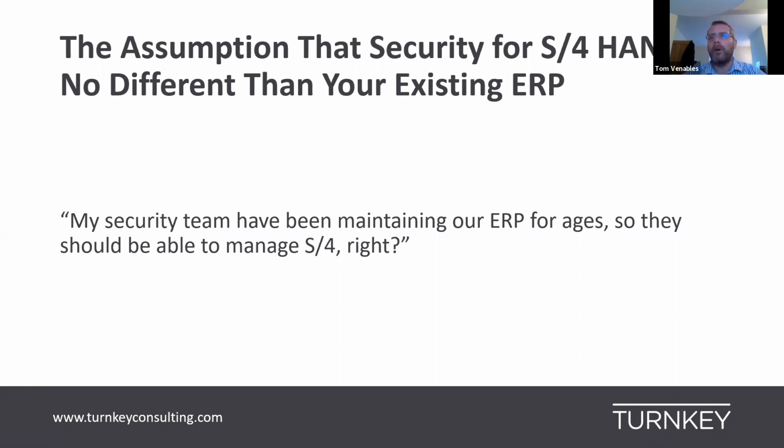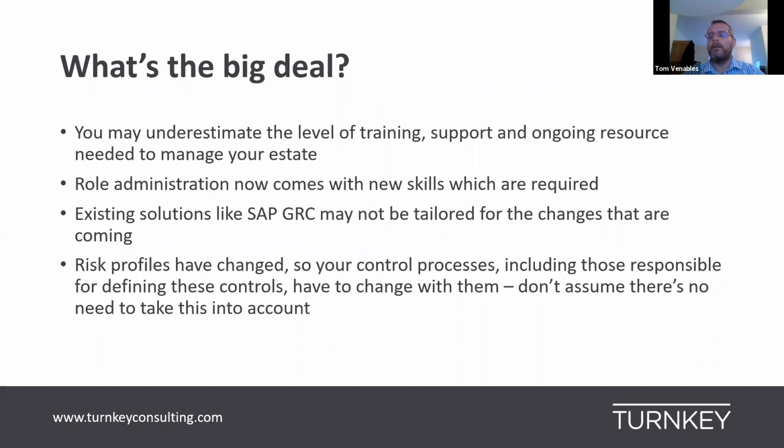And also the processes that you're used to operating, I mentioned vendors and customers earlier, those processes are changing. So the security that you used to apply around those is slightly different. So if you're just assuming that because it's SAP to SAP, it's not going to be too difficult, you can fall a little bit afoul of not knowing that you need training support from your SIs or specialist services. And the ongoing resource. You may underestimate that you're about to double the overhead on key resources.